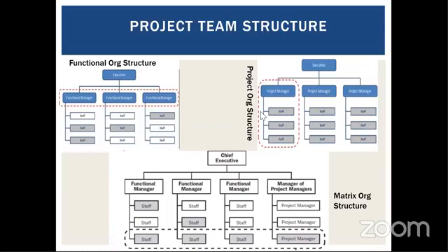Validation comes from QA and the QA teams and the business teams. Development needs to finish on a certain date that we've identified. Then it goes into QA for testing, regression testing, and then the business unit will come back and validate if the development was done in accordance to how the documents or the requirements were written.